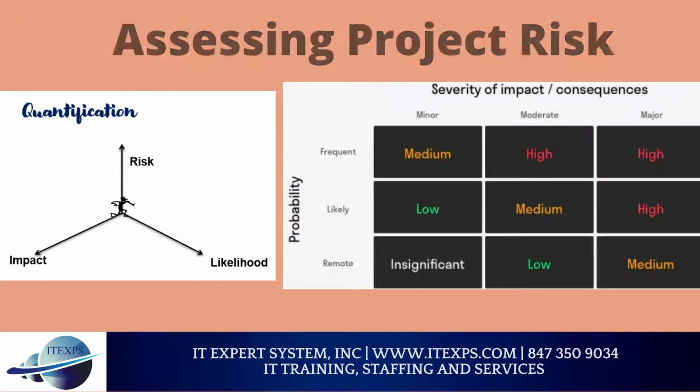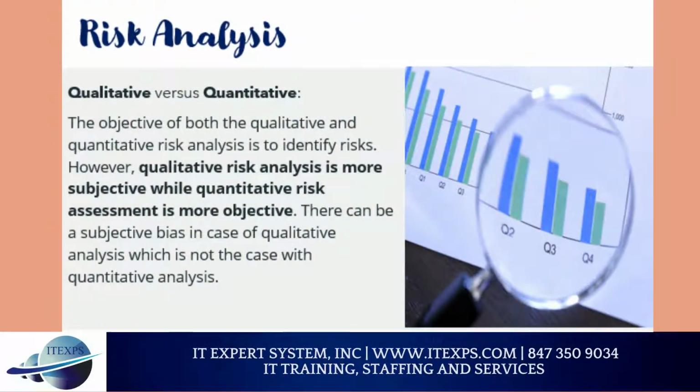Risk analysis. Risk should be analyzed qualitatively. Identify risk impact in some category form: high, medium, low. This is very subjective but it's easy to explain. Quantitative. Identify risk impact in a numeric form: 90%. This is very objective, but it's hard to explain.